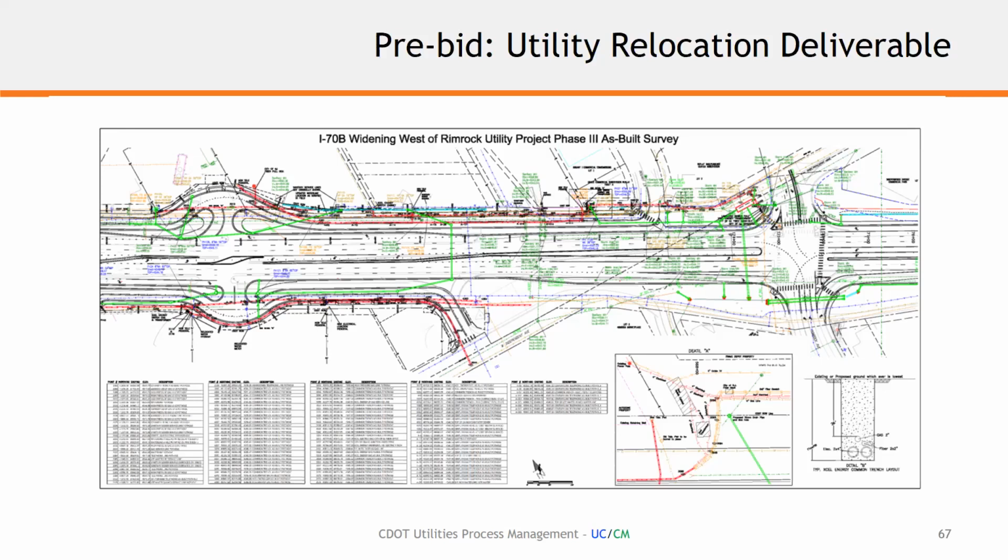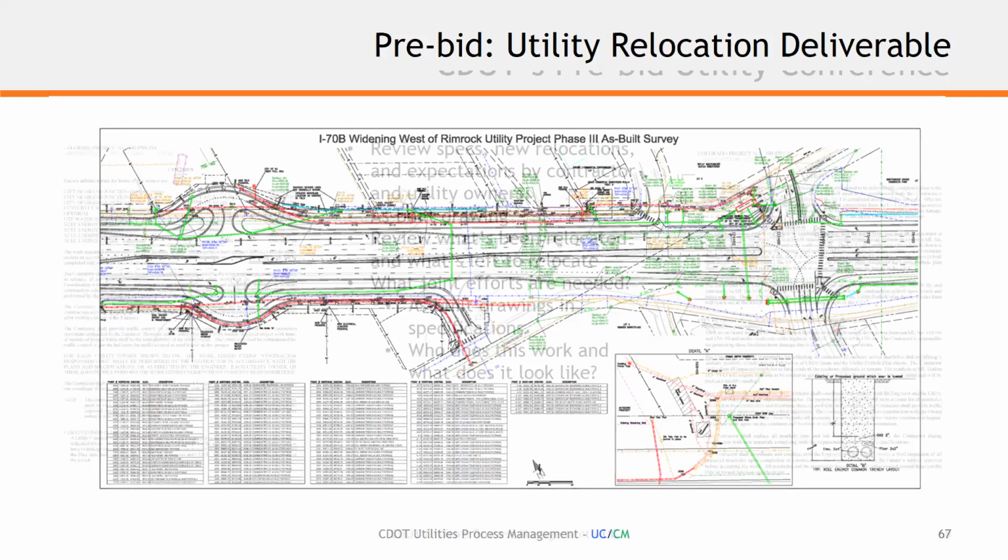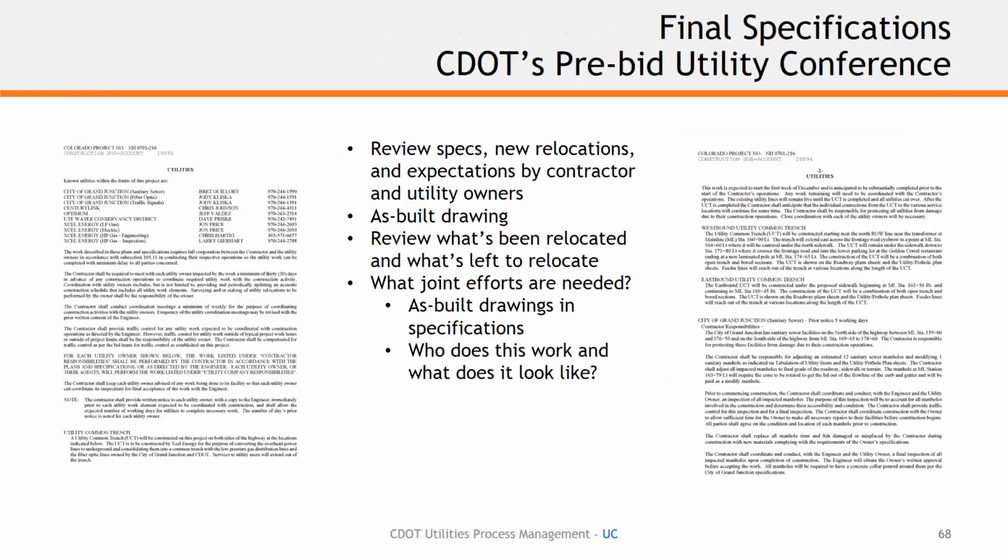also those crossings. There are crossings of this new storm drain of those lines, but we adjusted them vertically to accommodate excavation over the top, and they had coordinates to verify that. So this was, again, the level of effort that we felt was very beneficial to our project, in the fact that we went through the specification. This final specification was built off of what we had going on with the utility construction project.